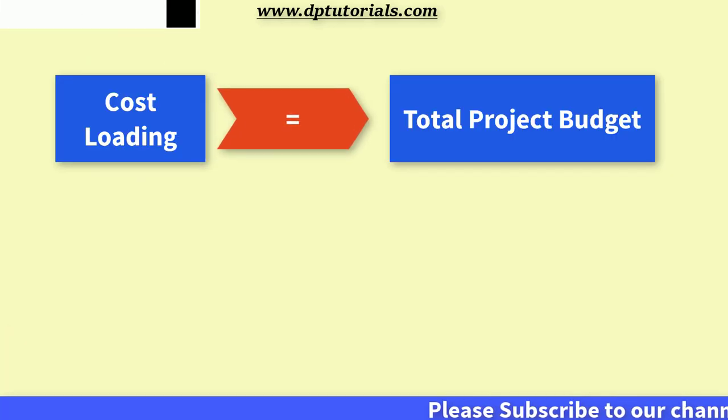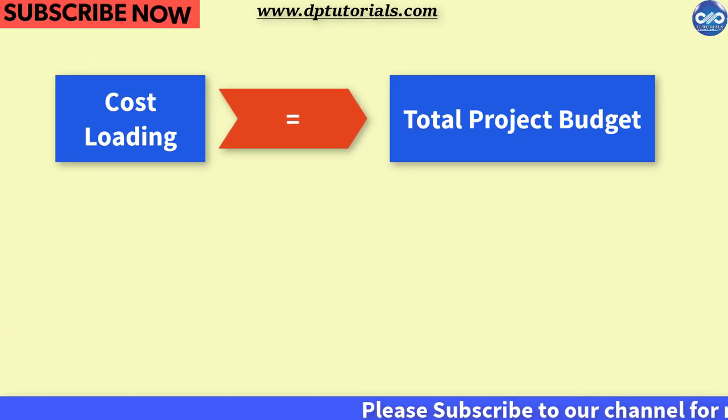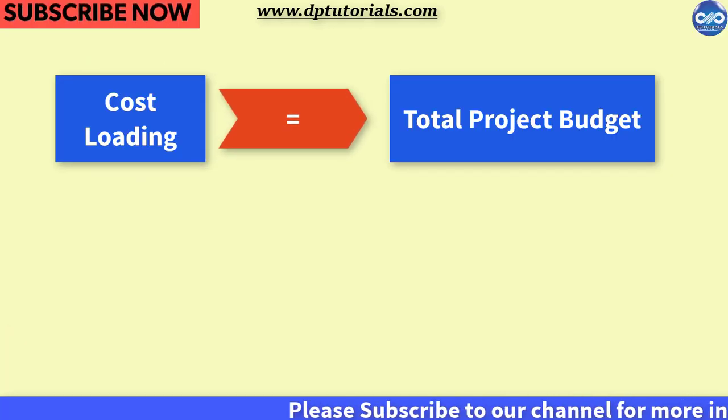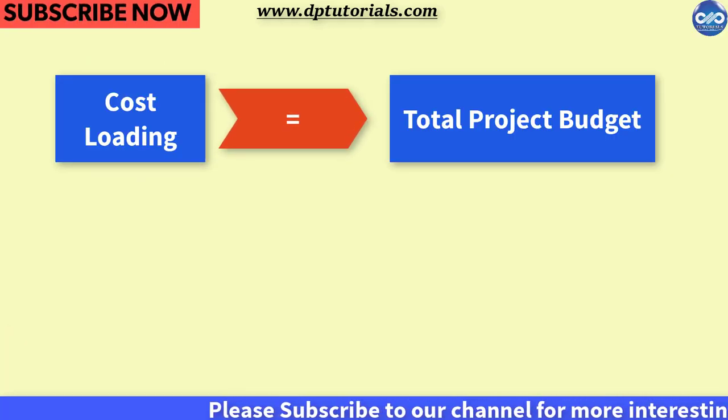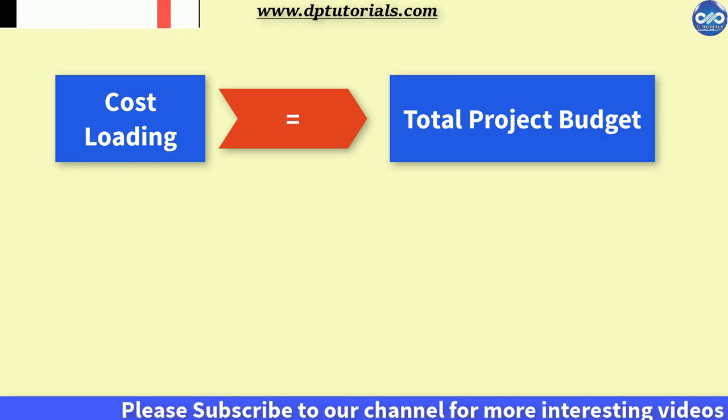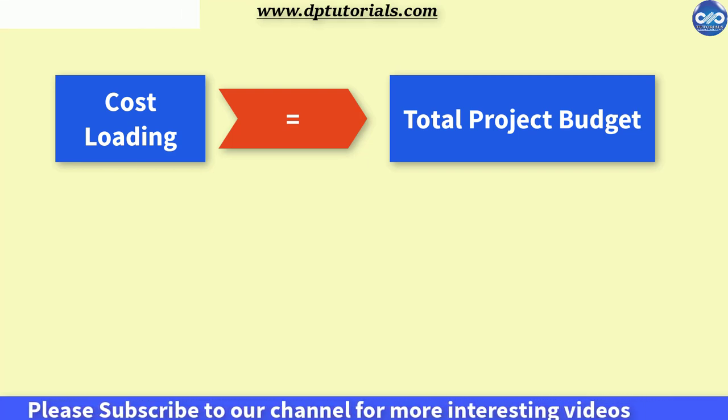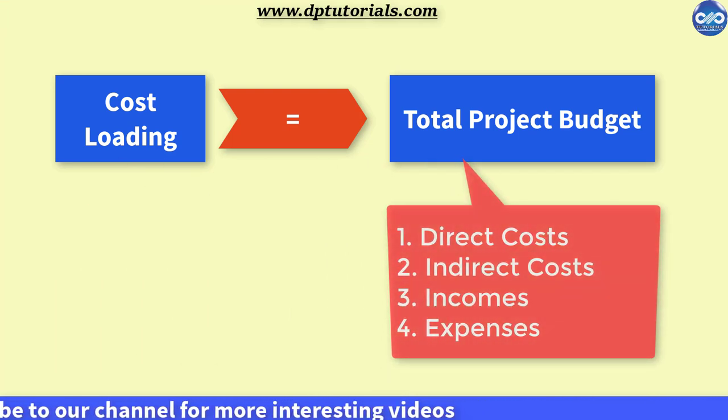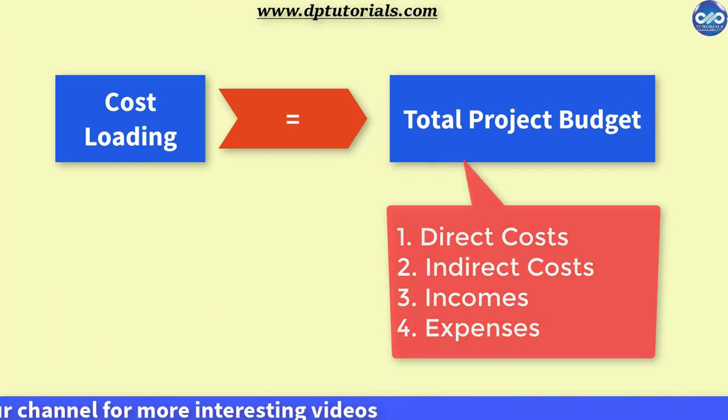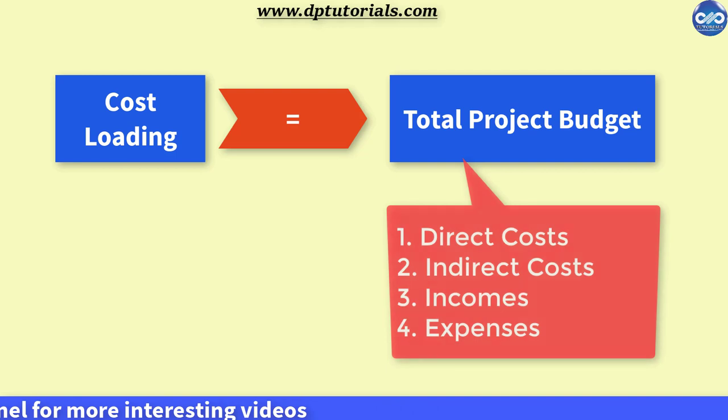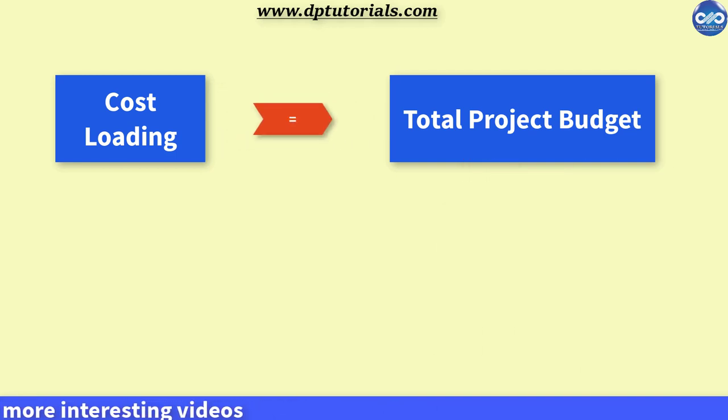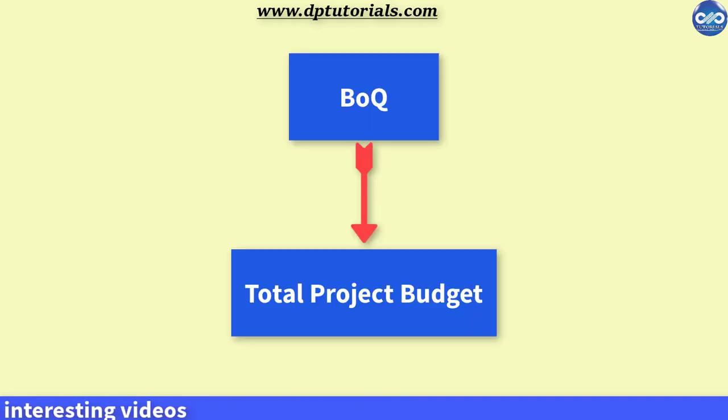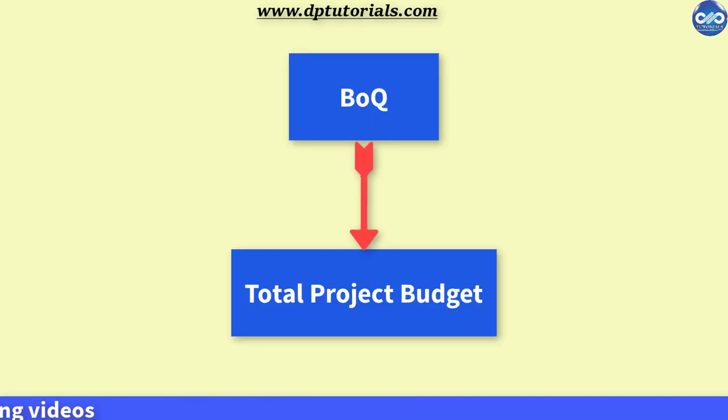Cost loading schedule represents your entire budget for the project including all the direct, indirect costs, incomes or expenses. Generally, BOQs will be used to distribute the total budget amount across all the activities in your project in P6.